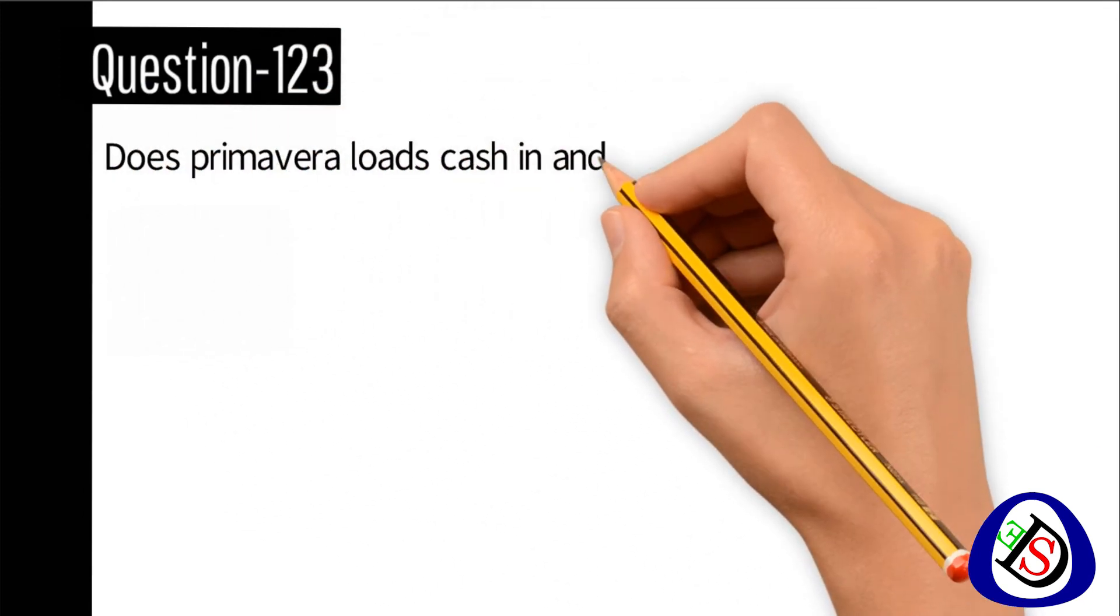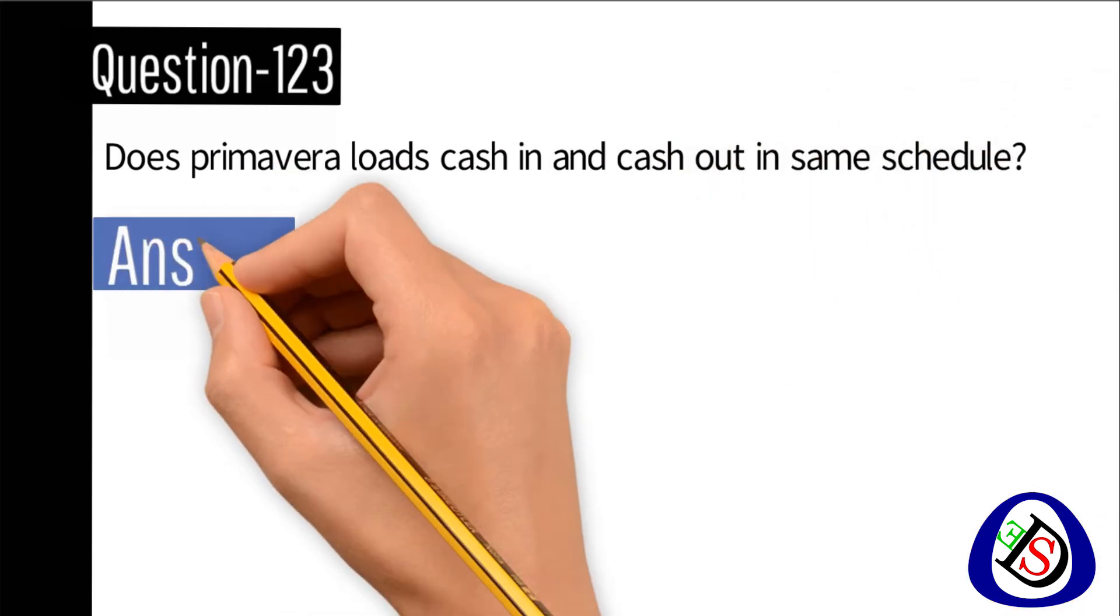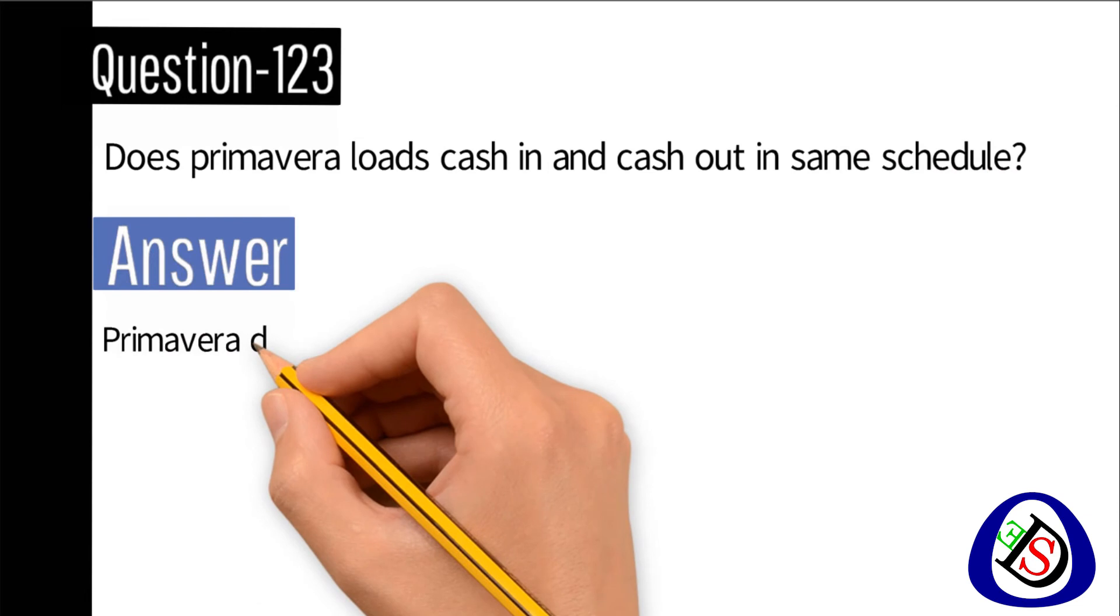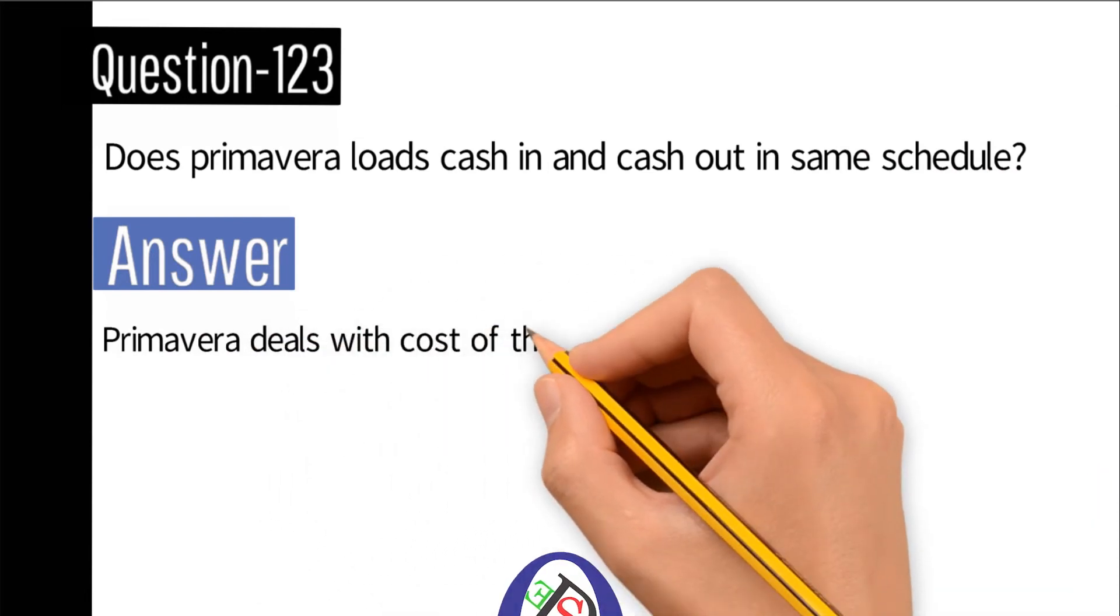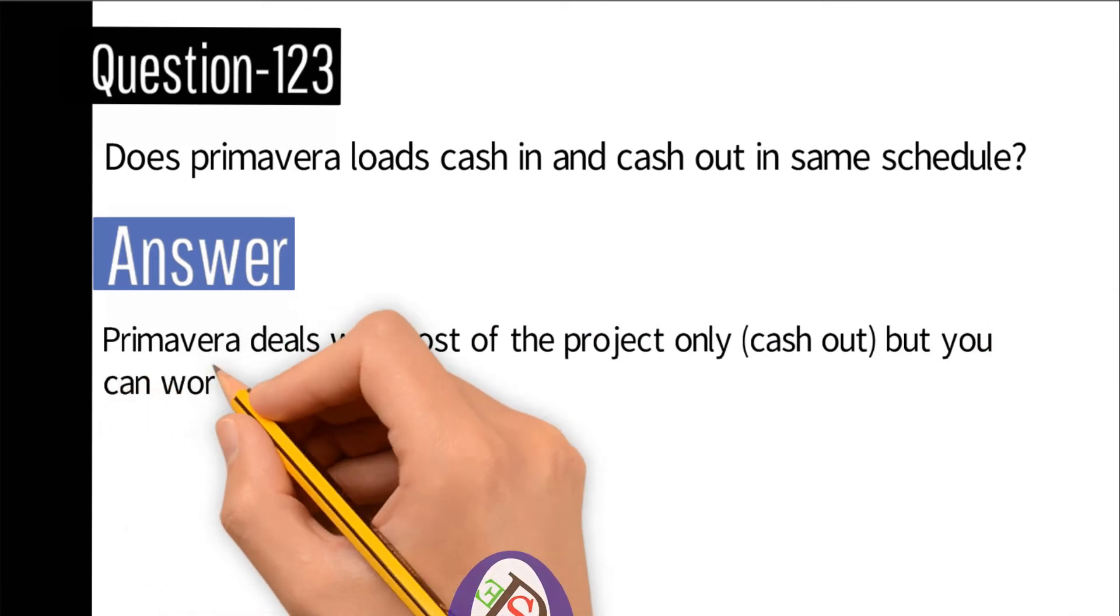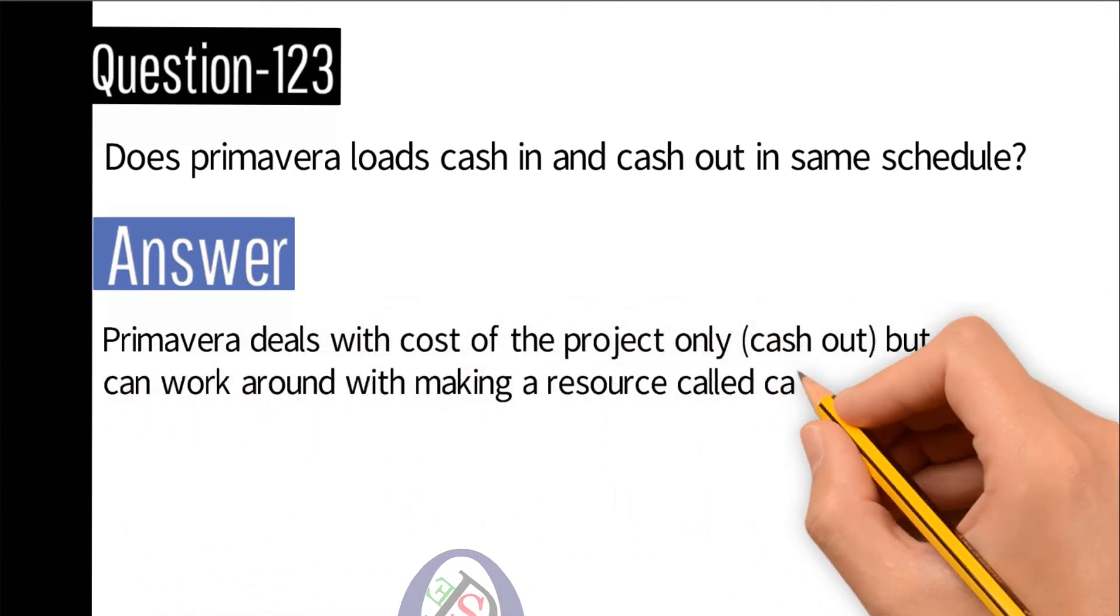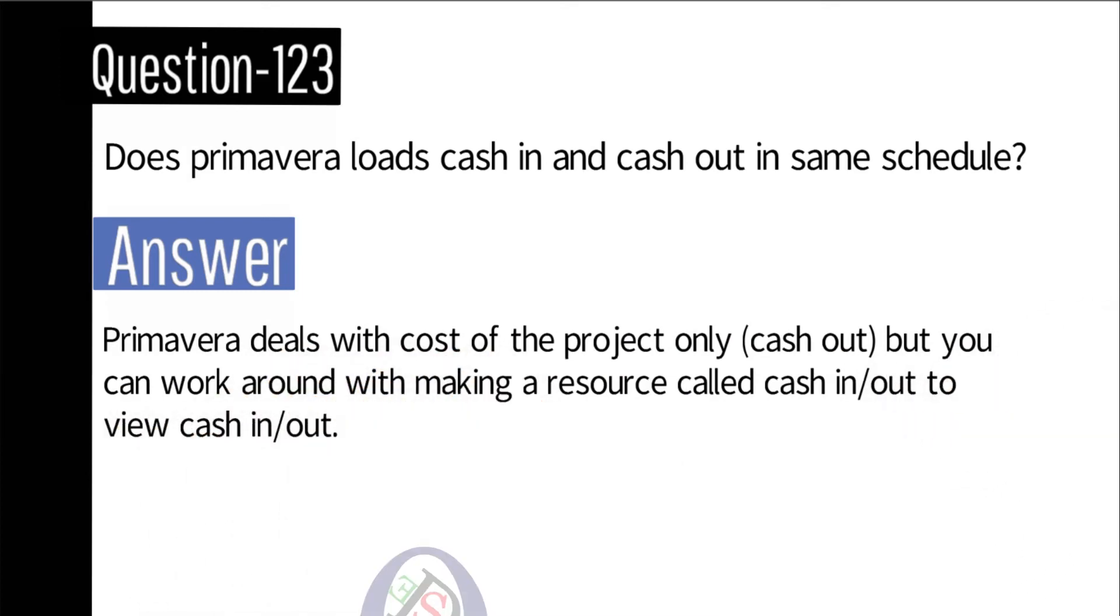Question number 123: Does Primavera load cash in and cash out in same schedule? Answer: Primavera deals with cost of the project only, cash out. But you can work around by making a resource called cash in or cash out to view cash in or out.